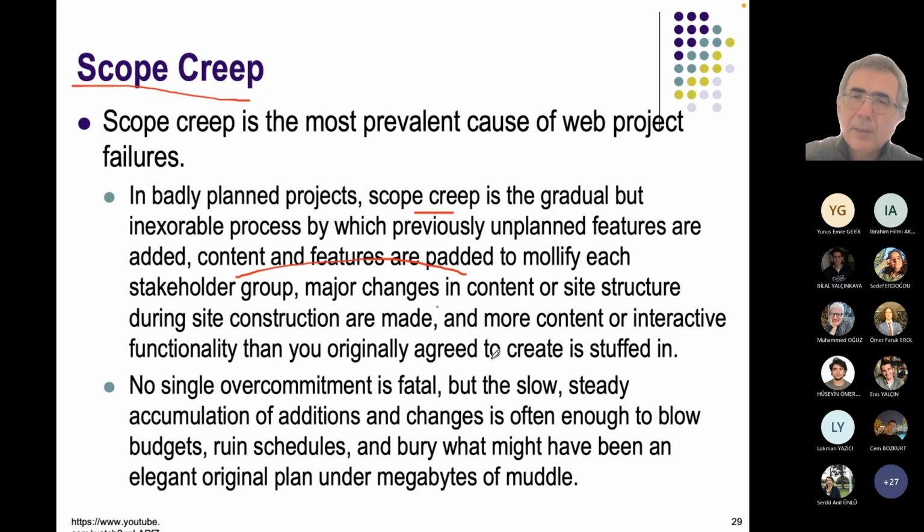In that case, the project is not finished and the budget is increased. Sometimes you go to court because the payment is not increased. The customer asks many things from you which were not originally planned. What you do at the end is quite different from what you planned at the beginning. This is what we call scope creep, and it must be prevented.